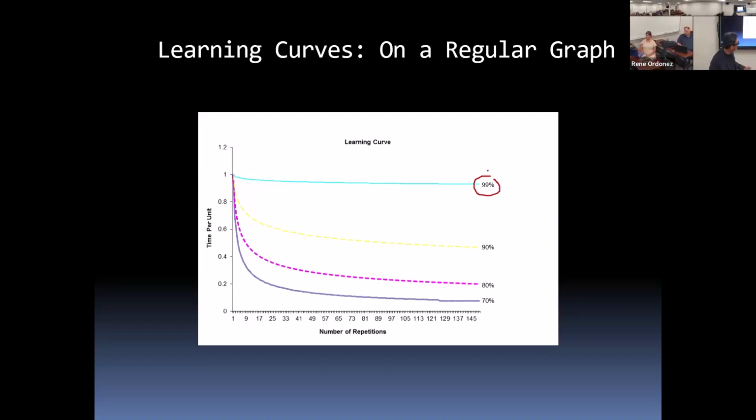Okay? So of course, you can see if this person is already good at this job because you have the T1. How long did it take this person to complete the first unit? Maybe this job is sort of the experience level, how many hours or how long it will take this person to complete the task. Then you can determine whether this person is expert or not able to learn. Okay? So as the learning percentage decreases, that tells you that the learning improvement is also faster. That's what I meant by the learning percentage being the complement of the learning rate.